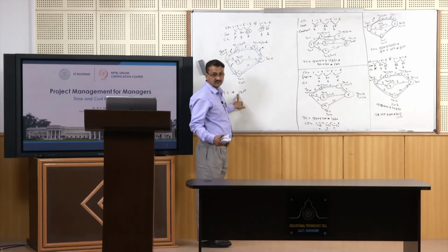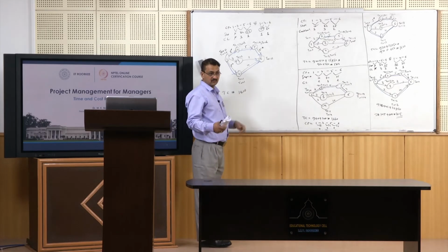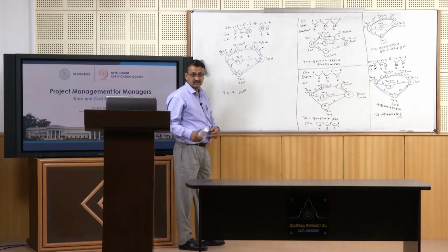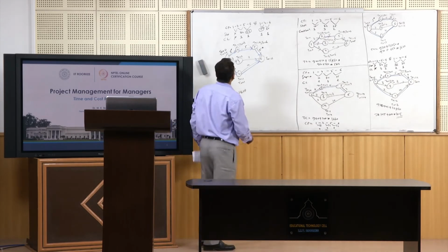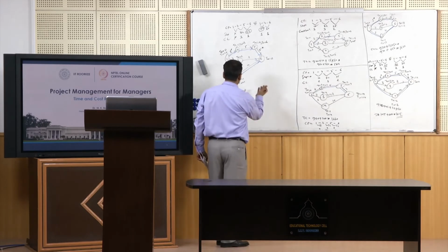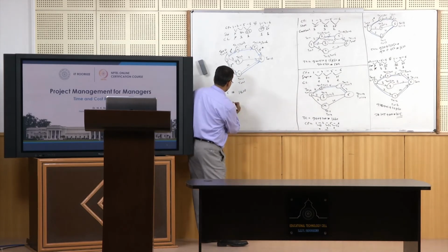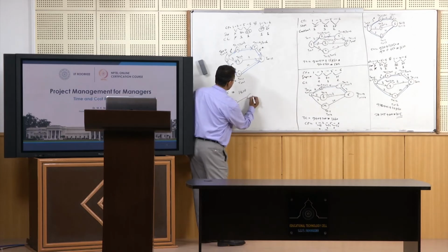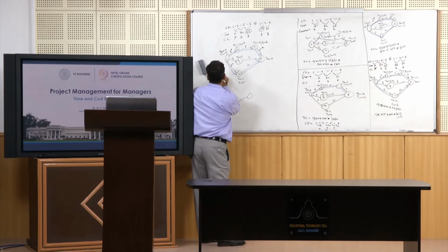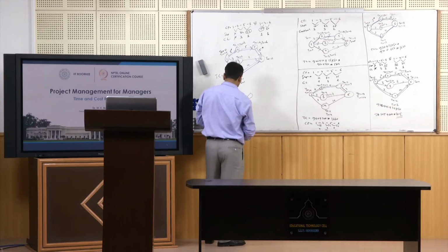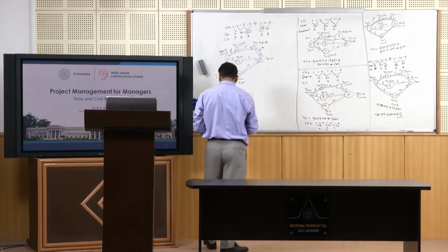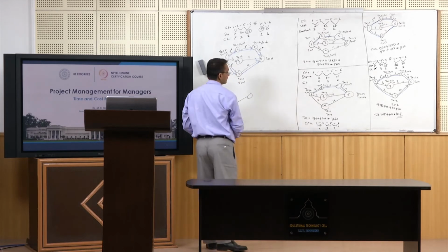No, 14 rupees. So that option is not advisable, but if you want, you can still do that. You can make one more final network just for your convenience. So total cost for this is 1610, right? For 11th day the total cost is 1610, right?